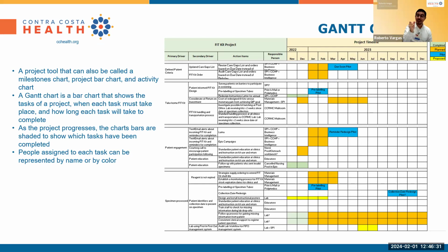And so I'm putting in color coding. You don't have to necessarily be color coded. I wanted to be a little bit more detailed, where I had completed, plan, pilot, and you can add in some colors there to represent, did I complete this thing? Is it still in the planning stage, or am I just proposing it? And I map out at what point in time I want to get this activity done. Right, this is a great team tool for really getting on the same page and making sure that we're sharing this so everyone knows what their responsibility is and when they need to get certain things done.